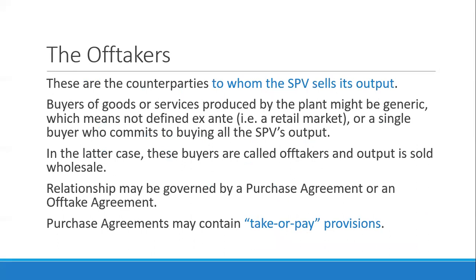Offtakers are the counterparties to whom the SPV sells its output. In the Bulacan bulk project, the offtakers are the different water districts within the province of Bulacan — multiple buyers but a set number of 20-plus. Their relationship is governed by a purchase agreement or offtake agreement, which usually includes take-or-pay provisions.